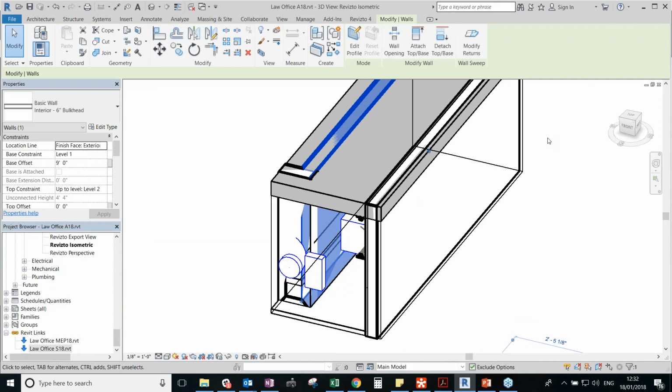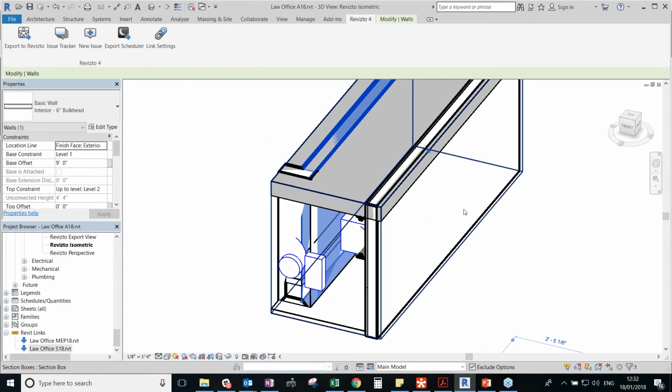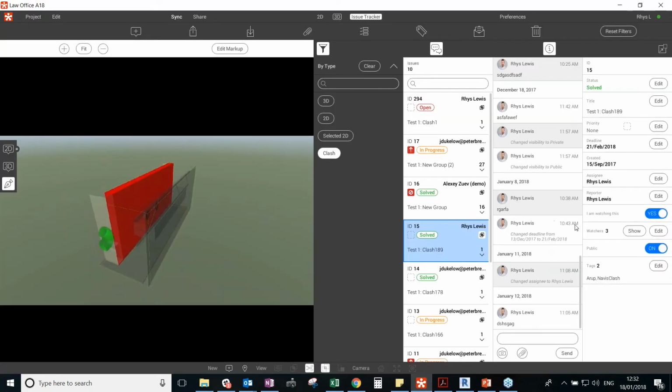And that's a little bit underestimated. When I sit down with project teams and just think amongst yourselves, or to yourselves rather, we're not all in the same room, how much time that takes if you're going through the process of looking at a PDF file with 400 clashes, and that's a list of all clashes from that exercise that was run. There's only 10 that relate to us. Where are these now in our Revit models or AutoCAD models or ArchiCAD models? And the same process for the BCF, then you need to navigate through your Revit model, work out where this minute clash is, fix it, and then respond.